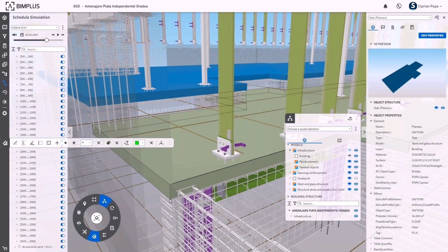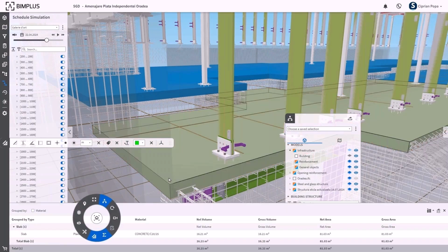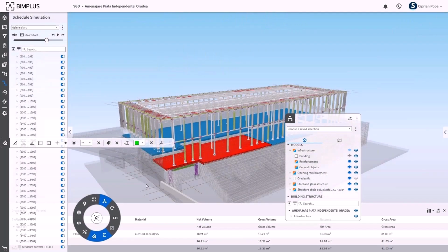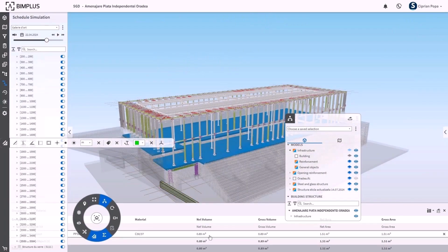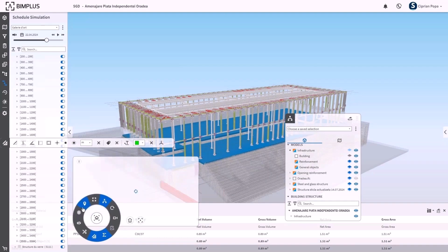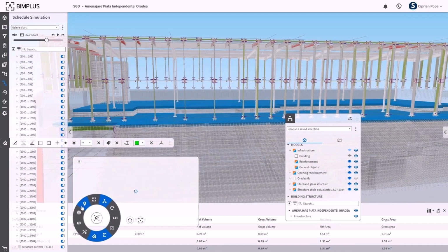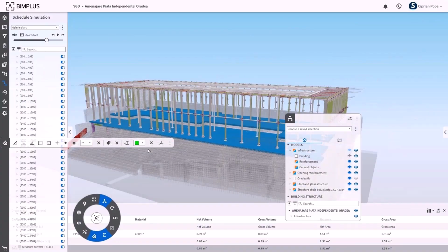So everything is just there, but it's important for the one who's responsible for it and who knows the deadlines and follows and wants to update, or wants to pour this plate, for instance, that instantly he gets results of the formwork needed, concrete that needs to be ordered, the quality of concrete. So it's a very easy way of accessing all this smart data, which is there by default, by the way the BIM authoring tool created it, or any other software like SCIA provided and SDS2 and so on. So all these attributes can be read with this platform.